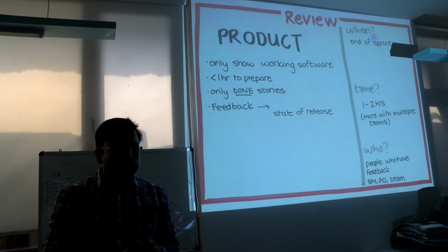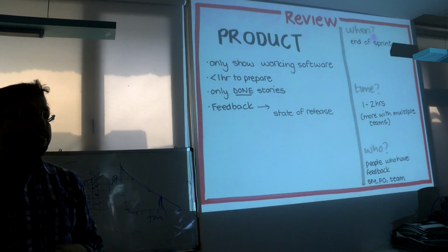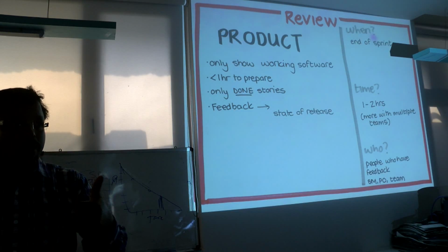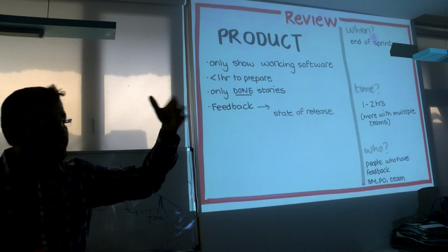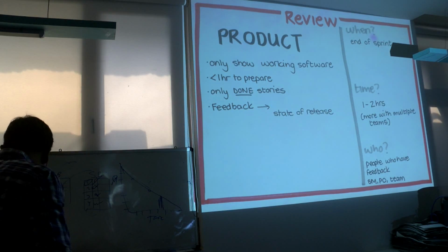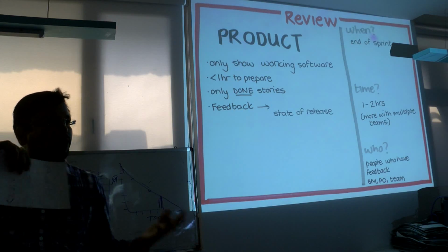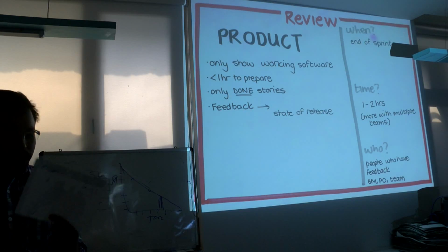Acceptance criteria includes the complete functional workflow. The acceptance criteria is defined at the time of sprint planning. In sprint planning meeting one, you remember there were acceptance criteria. I created this as a user story. Whatever the acceptance criteria, whether the complete workflow or whatever functionality, created by the product owner and stakeholder for this task, you have to match these things.